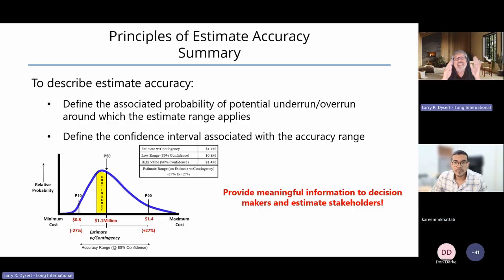We have to be able to think, is that really conceivable? So some of our risk tools, such as @Risk or Crystal Ball, have what's called a bounded triangular, where it takes your low value and the high value, and then you can associate and say that low value really represents the P5 value or the P10 value, and my high value actually represents the P90 or the P95 value.